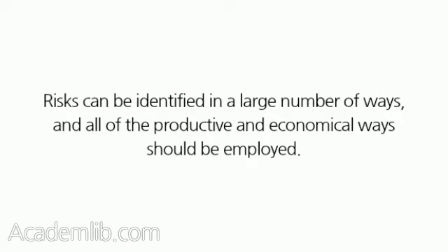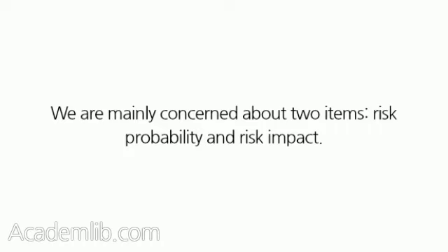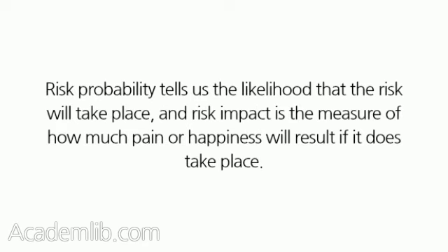employed. Risk quantification is the process of evaluating the risk as a potential threat or opportunity. We are mainly concerned about 2 items, risk probability and risk impact. Risk probability tells us the likelihood that the risk will take place, and risk impact is the measure of how much pain or happiness will result if it does take place.